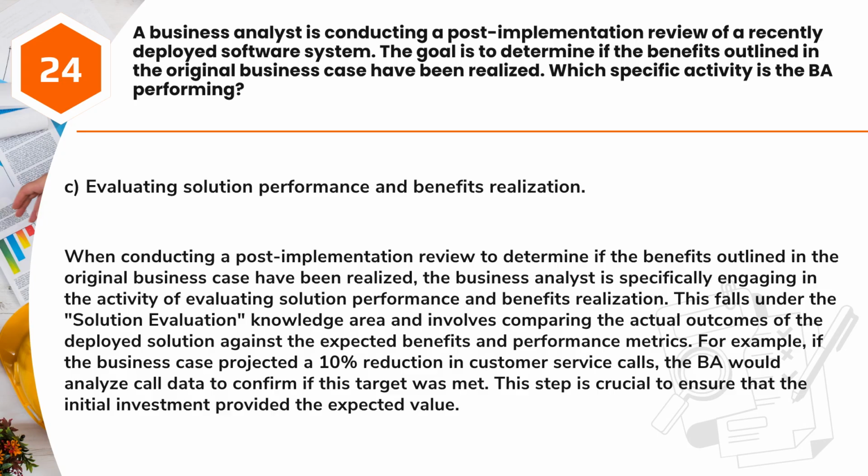For example, if the business case projected a 10% reduction in customer service calls, the BA would analyze call data to confirm if this target was met. This step is crucial to ensure that the initial investment provided the expected value.